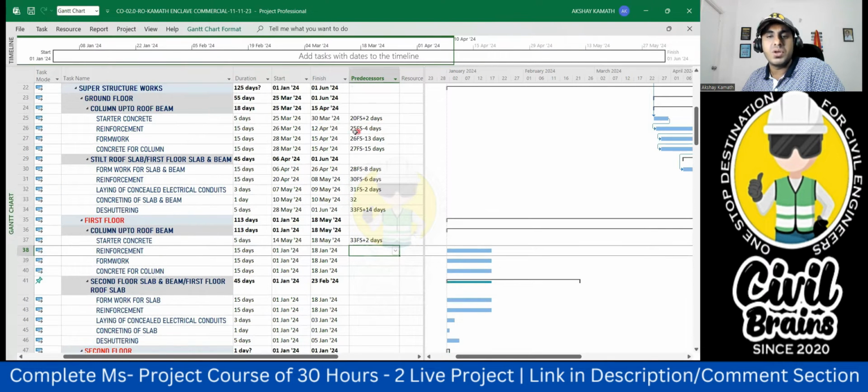Whatever lag you had given, 25 FS minus 4 you had given. That means from the end of the starter concrete, 4 days before that, you start your reinforcement. Same connections, again, we'll follow the same. Lead and lag, whatever you are given.